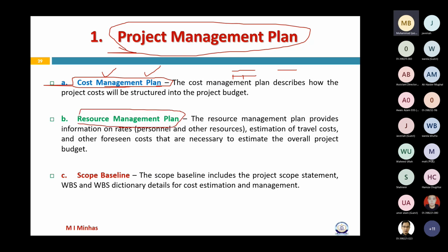You see, when you reconcile the resources, like activities, let's say previously an activity was planned in the month of November and now that activity has been moved to December. So do you think that our resources would be available in December too? It might not be the case. So we need to see what is the availability of resources on a particular day, maybe week, when we are rescheduling our task. Correct? Yes. Okay. And why scope baseline?